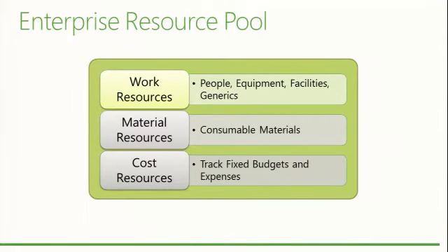So you might have travel expenses, shipping costs, hardware purchases, maybe you hire a vendor or a contractor or hire somebody to create something and deliver it for you. So deliverables-based work or fixed-price work, you can represent that with these cost resources in Microsoft Project and in Project Server.